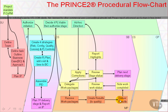Review of stage status can result in the allocation of the next set of activities, or trigger planning of the next stage, or trigger normal project closure. Assuming the current delivery stage is not the last, by following the activity described in managing a stage boundary, the project management team will prepare the decision support information the project board will need to approve the project's continuation and the next stage's start. Executing the stage just ending and planning the stage about to start generates information to update the project plan, risk register and business case, possibly also the project management team memberships, assigned duties, reporting lines and report timings. The required controls and management strategies may all be updated — i.e. we may update the PID.